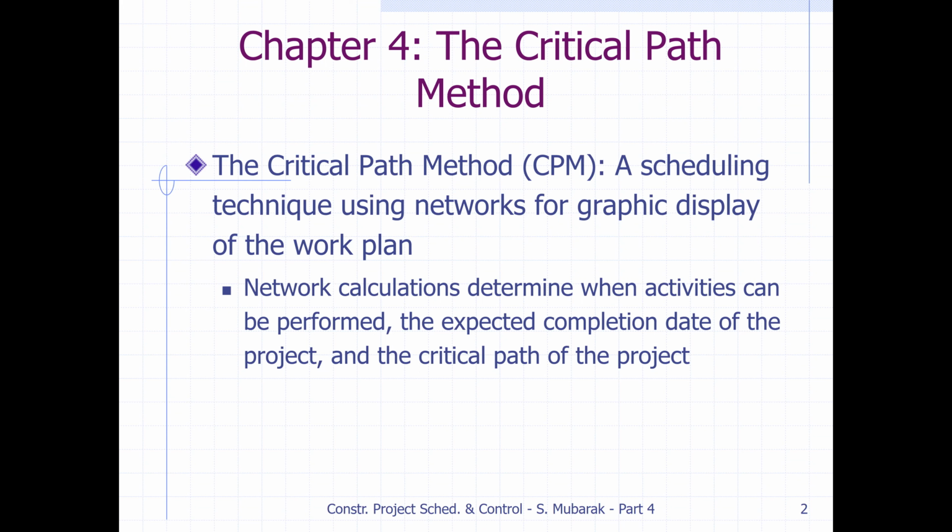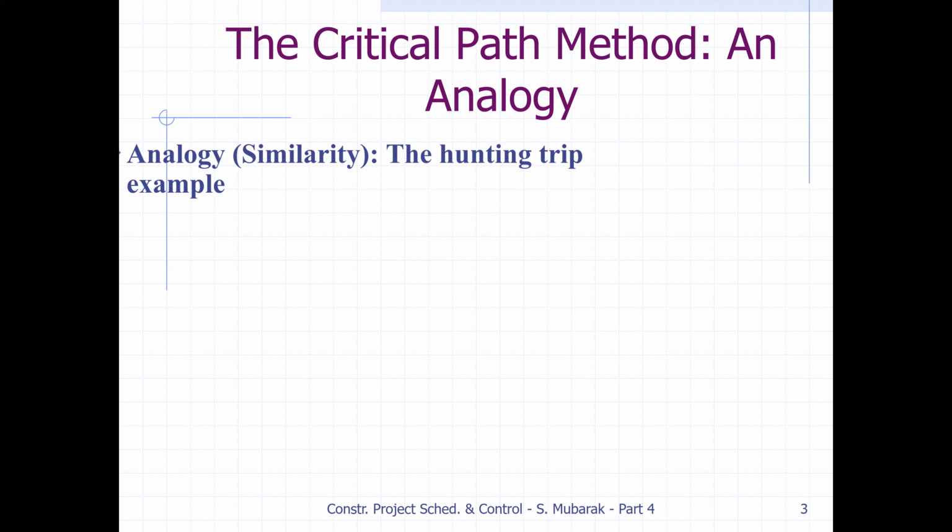So what are the activities on the critical path that we must complete on time to complete the project according to our contract? If we delay any activity on the critical path, then our project will get delayed. So to avoid any delay, we have to complete all those activities on the critical path according to the time that we have calculated in the critical path.